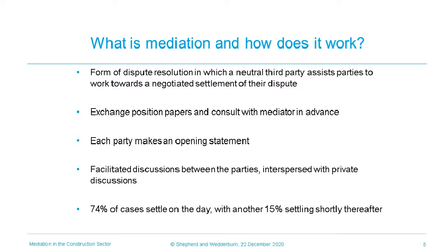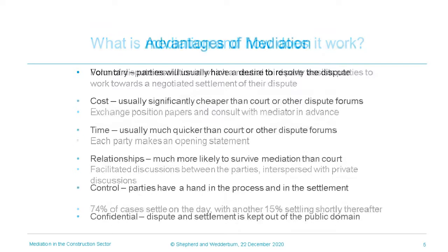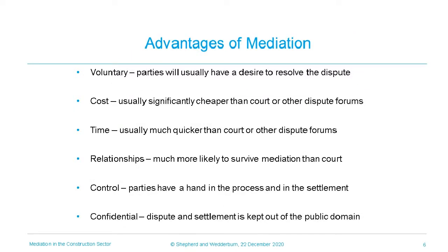Mediation generally has a high success rate. Mediators who responded to the CEDR's most recent mediation audit reported that just over 74% of their cases settled on the day, with another 15% settling shortly thereafter. As we have just explained, mediation has a very high success rate, which has a benefit in itself. This figure is perhaps less surprising when you consider the fact that mediation is a voluntary process, and so parties are generally only likely to agree to mediate where they believe that a settlement could be reached.